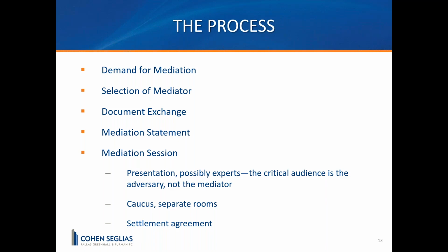And then there's the mediation session itself. Typically, there are presentations or opening statements done. And in terms of that, the critical audience is actually your adversary, not the mediator. The mediator at that point has already reviewed all of the papers and understands the parties' positions. And then the mediator will have breakout rooms, essentially, where either side will go into a separate room and do what we call shuttle diplomacy, where they'll go back and forth talking to the different parties with respect to their positions. And then hopefully, ultimately, the mediation ends with a settlement agreement being reached.